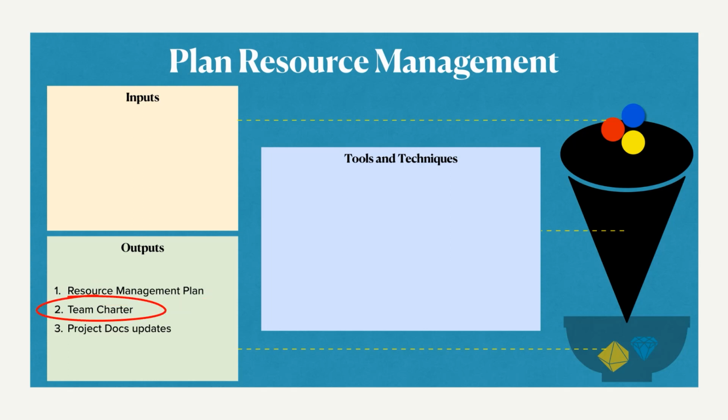Team charter, new term, right? We have discussed project charter before, but I think team charter we are hearing for the first time here. So this is nothing but an agreement. You remember a project charter is an approved agreement, right? So here also team charter is an agreement that holds the values or the operating guidelines within the team. So this is done so that the expectations of the behavior from the team are clear to everyone, right? So we expect something from the team and the team has to agree to this.